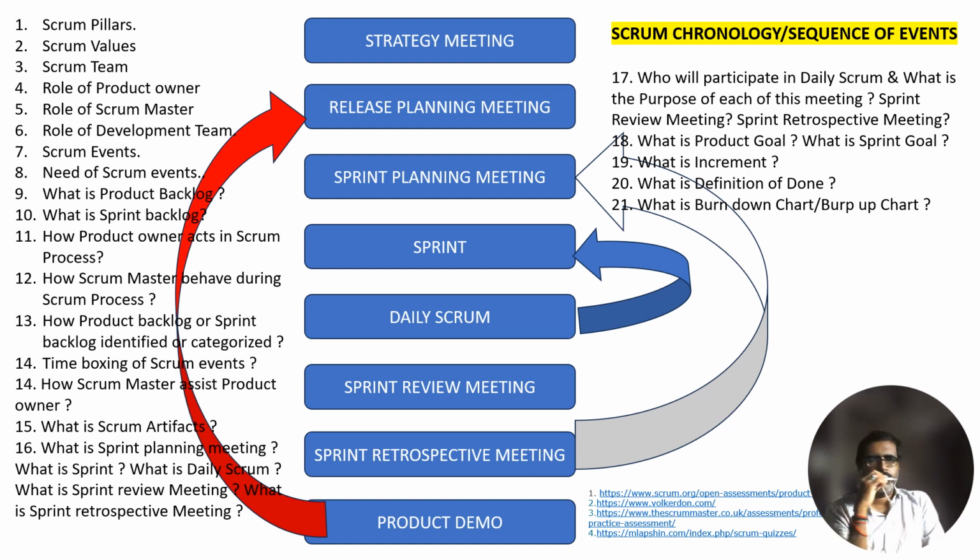Third, the product backlog, which is defined in Scrum, as I have already told. High priority items will be placed first, that is, in release 1. The items in this area are mostly prioritized. In release 2, we might prioritize features at this depth based on the targeted product roadmap release, for example release 2 or release 3. In release 3, those are low priority items, with little or no effort spent prioritizing items within the future releases.